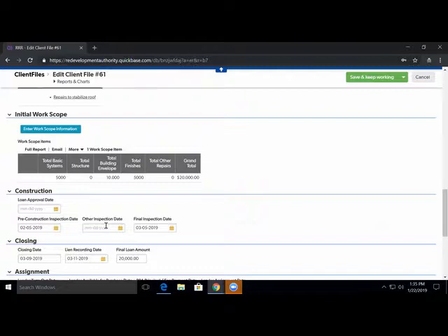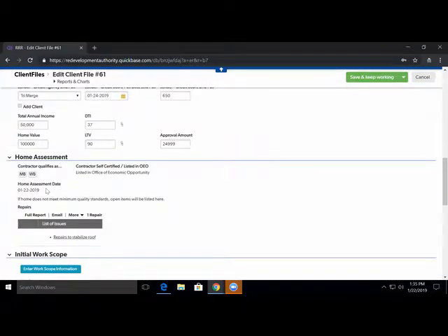Can you tell me, though, you only have space for one contractor in terms of MBE, WBE. If there are more than one contractor, regardless of how we manage to get them paid, or cut 2 checks at the end of the period, do we just have one contractor listed? No, we can list 2 contractors, and as I remember the process discussions, if there is more than one contractor, the lenders, and correct me if I'm wrong, said that you could cut checks to different contractors. Right. But it has to be above $10,000 to do the initial draw, and if both of them are below $10,000, you would cut 2 checks at the end, one to each contractor.